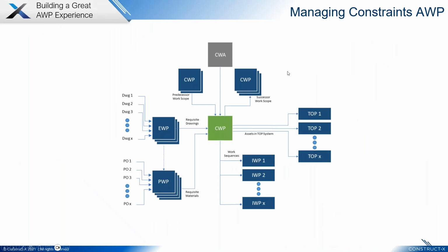When we look at the breakdown and the details, we develop these relationships, right? Same thing. There's a bunch of stuff. If we come into construction work packages, a lot of engineering information, a lot of procurement information, prerequisite CWPs, right? So when we release this, we want to know that the prerequisite work, the engineering work, and the procurement work are all there. So again, shield, right?